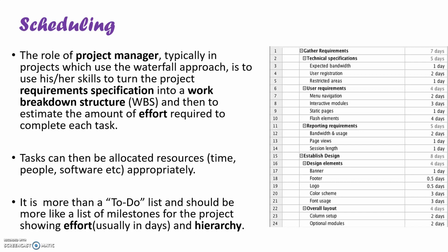And next to that, you can see what's called the effort. Now, they've broken the effort down into days. Depending on the size and scope of your project, you might break your effort down into hours, or it could even be weeks or months, just depending on what it is that you're creating.